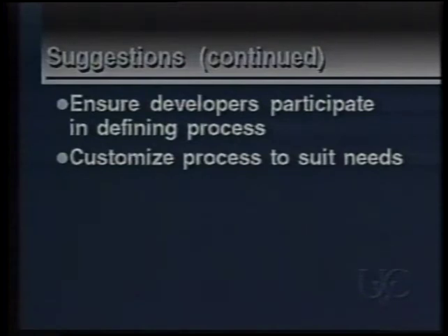If you have a written process, or let me be more strict here, when you have a written process, if you don't have one already, make sure that the process is customizable to suit the needs of the different products, different sizes of projects that are going on within the organization. What we found was that one process does not fit all, even within one group. And we made sure that people, engineers in the organization, could go through steps to slightly modify the process based on the product that they were developing.